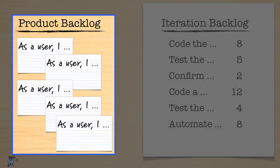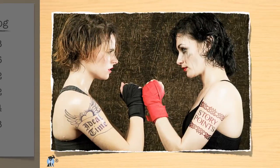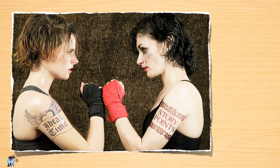Most teams tend to write their Product Backlog in the form of user stories — short, simple statements told from the perspective of a user, as I've shown here. Throughout this module, we're going to look at two different units that Agile teams commonly use for estimating their Product Backlogs: Story Points and Ideal Days.